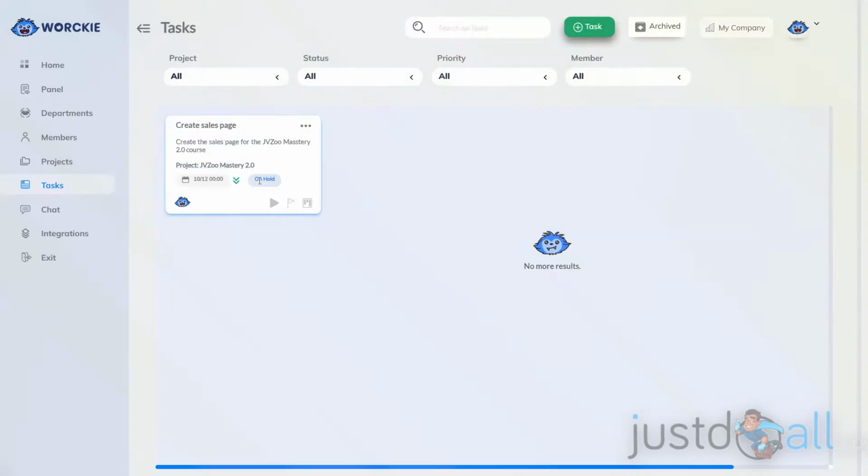It also shows the status of this task. The avatars indicate what members are assigned to this task. You've also got a mini toolbar on the bottom right-hand corner of this card. The first item is when you can start the timer for this task. This is a tool that members can use to indicate that they're actively working on the task. So if they click this button, it will actually start a timer, and you can see that there's a pause button. So the timer is actually keeping track of the time that they are in that task and working on it. Once they're finished working on the task, they can go back to this card and click the pause button, and it will actually track how much time they spent on that task.